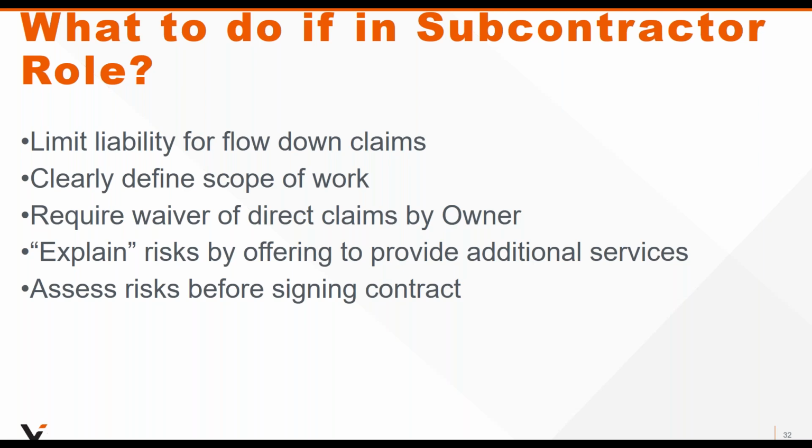The other issue that we often see is your client, the design builder, settling up any claims that they have with the owner and assigning the design builder's ability to go after you directly to the owner and walking away.